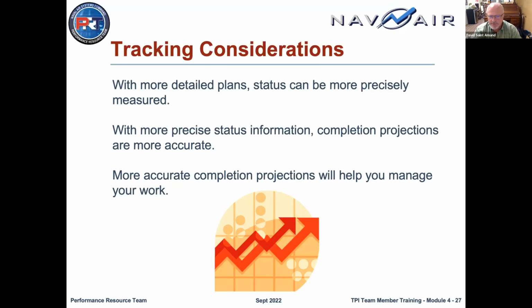Interesting, there's a question that somebody asked earlier today: how long does it take to get these plans completed? And the answer in short is that the more practice they've had planning, the less time it takes. And if you add into that some pre-work that they bring to the planning session, then they can take even less time. But we've had a plan to develop a camera on a test stand that was for use out on the ranges, where the team had a very detailed set of requirements. It took them 3 weeks to get the plan out.